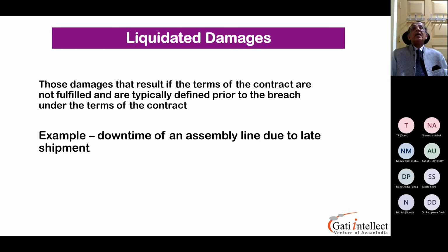Somehow the air freight shipment was delayed due to some reason on the airline's side. Even though everything was planned, there was a delay from the airline. This is beyond the control of the logistics company. So the manufacturing company cannot put a liquidated damage against anybody. This is where the company themselves have to have their own liability insurance.